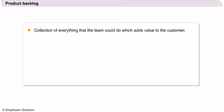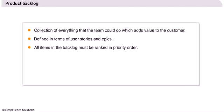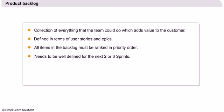Every such work item is expressed as a user story or an epic. All the items in the backlog need to be ranked and prioritized by the product owner. Ideally the product owner needs to have a fair amount of detail in the requirements or stories that will be taken up for work within the next two or three sprints.